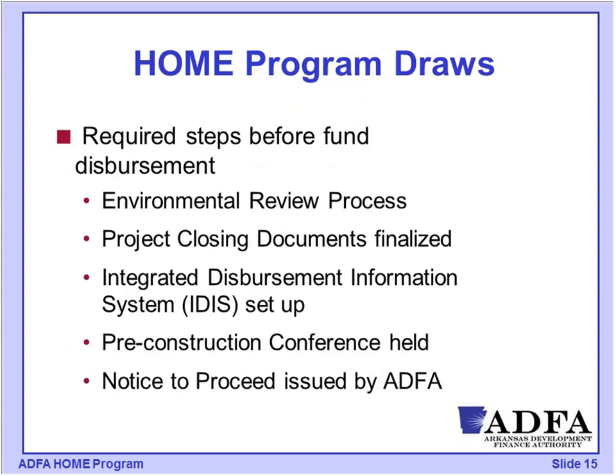So let's talk a little bit about what it will take to have your project ready so that you're eligible to draw HOME funds. Before you're eligible for a fund disbursement, we mentioned that the environmental review process must be completed. The release of funds would have been received. Your closing documents would be finalized. So you have that written agreement in place.